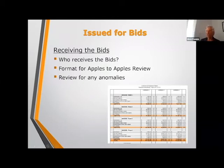So on the bottom here, you see a spreadsheet. This spreadsheet has base bid phase 1, base bid phase 2, base bid phase 3, base bid phase 4. And then in addition to that here, so this must be a paving job. It says mill and dispose, install base course, install top course. So now you can look at contractors X, Y, and Z and go across here and compare the prices. You can see the bottom subtotal for each phase and what the prices are. The thing this sheet doesn't show is the unit prices. This is just the firm price portion of the job.